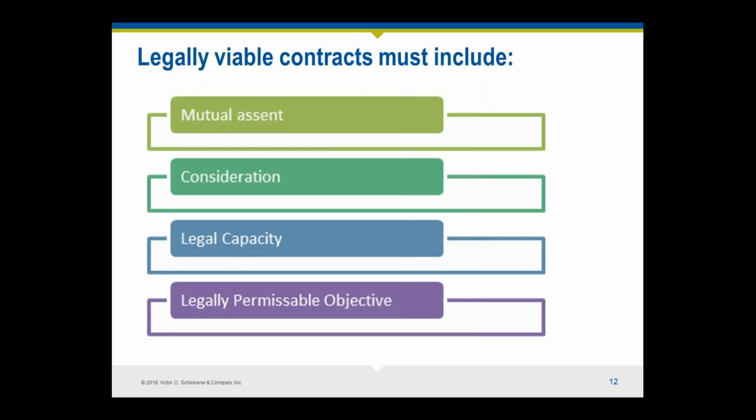It's that important. As a matter of fact, as I think I'm aware, California may be the only state where there's actually a law on the books, a statute that says that you should not be working on a project unless you have a signed agreement. There are some exceptions to that, of course, but they're still very long and involved. And the bottom line is if you have a fee dispute against your client, for example, in California, and you go into court and you don't have a signed agreement, they would probably throw that out and you might not ever get your fees. So please get a signed agreement.